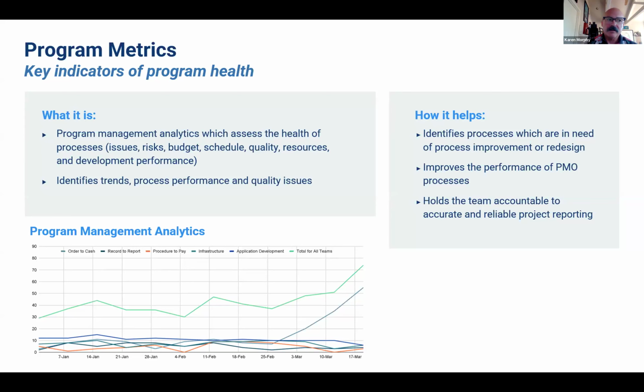So what we do at Elion is we devise metrics in the planning phase of a project. We determine what metrics would make sense throughout the life cycle of the project, and then how you might capture those and develop those reports against those metrics throughout the continuum of the project. So you want to have meaningful program metrics, which really can help with early warning signs of trouble.